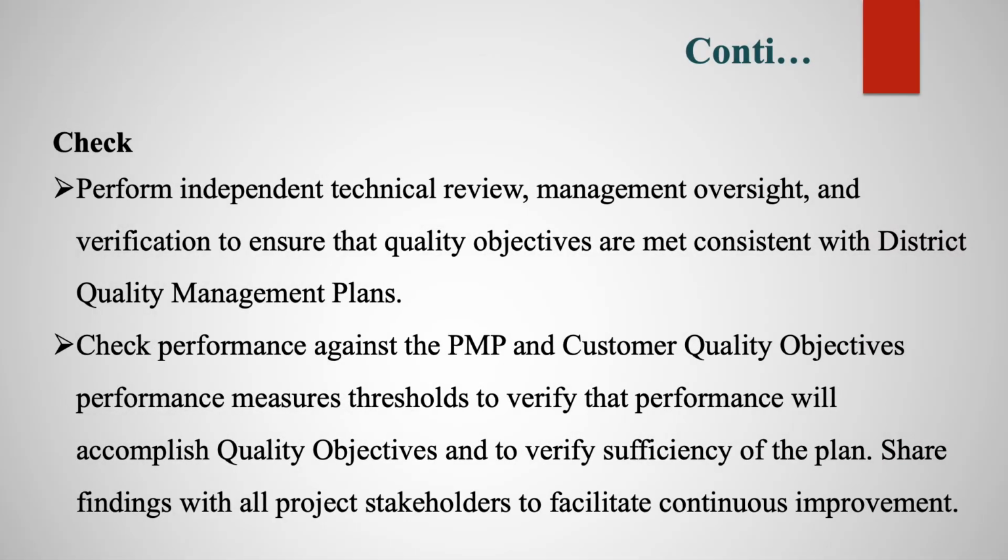And then check. Okay, you have to perform an independent technical review, management oversight, and verification to ensure that quality objectives are met, consistent with the district quality management plan. Check performance against the PMP and the customer quality objectives. The performance measures are the goals to verify that performance will accomplish quality objectives and verify the sufficiency of the plan. Okay, and then share the findings with all the project stakeholders to facilitate continuous improvement.